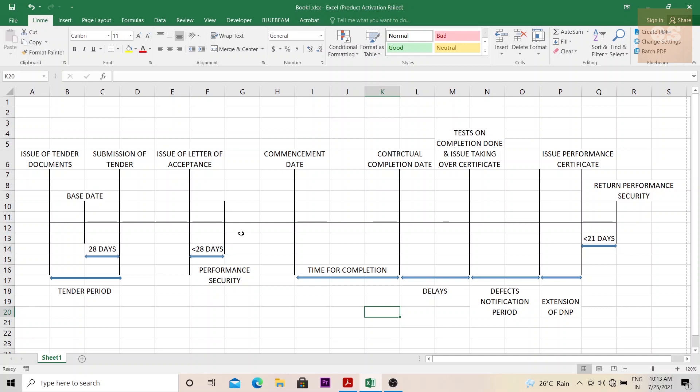After that, the contractor will make themselves ready to start this project. They will start staffing of the people, mobilizing people. If they require any advance payments for the mobilization, they will need to submit an advance guarantee so that the employer can pay an advance amount. The employer will also start making the site ready so that they can give possession of the site to the contractor and they can start moving in and begin the work. Once everything is ready, a date is finalized on which the contractor can start their execution of the work.